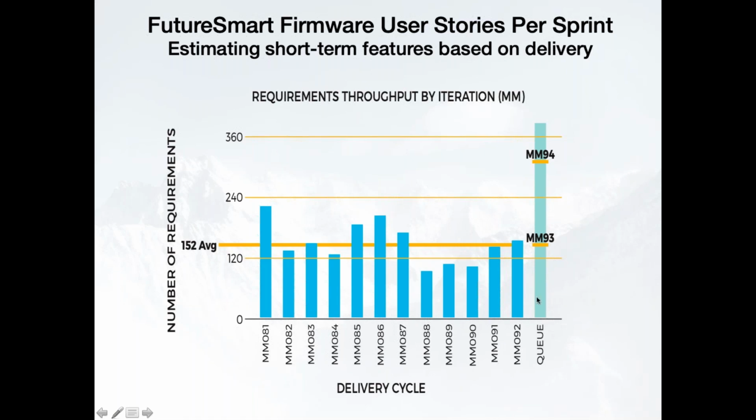If you wanted to know what was coming out next month, the stuff pretty low on here, you could count on. The stuff at the edge may or may not happen, but we were an organization focused on maximizing flow and getting efficient, and we were measuring our teams on really trying to improve and deliver as much as possible and eliminating waste and inefficiencies. And we weren't measuring the teams on accuracy to plan, because when you start holding people accountable for accuracy of plan, you buffer it, you get details, you spend 20% of your capacity planning instead of 5%, and you take away 15% of extra value that you could have been delivering.